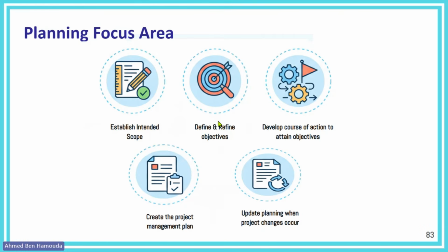In the planning focus area, usually you as a project manager, together with the key team members or maybe some experts, will create the project management plan. This is a document in which you explain how you're going to manage the project. This is in waterfall, especially in the full waterfall, not in the light waterfall, if it still makes sense to have it. Some companies still require this document.